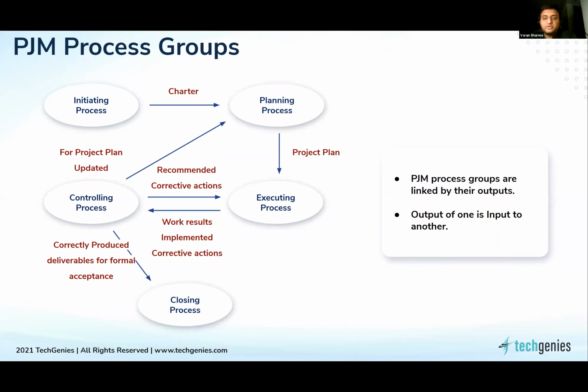And then of course closing the process, like closing a project, after creating a product which your customer wanted, getting a sign off from the client, putting in your lessons learned, and if there is an overrun or a delay, then doing causal analysis, Pareto analysis, or those sorts of things. So that's the closing part of the project.